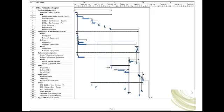The tasks install wiring and racks, and install telephone gear, have an estimated duration of four days and one day respectively. The durations were estimated using a typical crew size of four. The telephone vendor only has a three-man crew available to travel to Florida on the estimated dates. Thus, the tasks have a revised duration of five days and 1.25 days for a total of 6.25 days. The telephone vendor would have to round up to seven days for a total of 168 man hours.